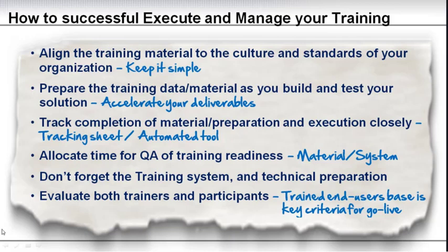It is not with the purpose to point fingers, it is to find out if anything needs to be changed in the material, in the system, in the training content, with the goal to make sure that you have a trained end user base ready before you go live. If your system is ready and it's tested, but the users don't know what to do, you cannot go live. A trained end user base is a key criteria for go live. So make sure you evaluate and take action.